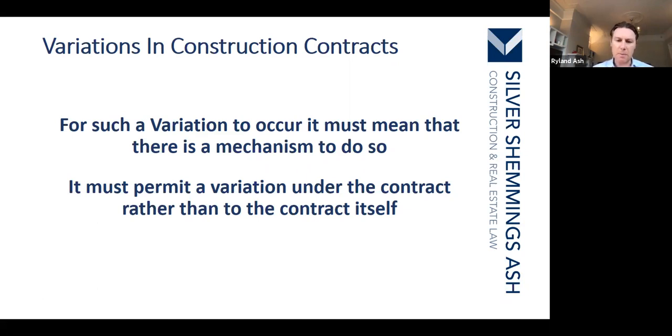And in the same way, if you think about it, if a contract has a provision that says how variations will be valued, then I'm afraid that would stand as well, notwithstanding the fact the parties may have sought to agree otherwise. So one has to be careful particularly when there are verbal agreements to change or perhaps to value or agree a valuation. Often you'll have QS to QS meeting up on the other side of the table, making agreements in relation to values. They may not have an effect if your contract has provisions that prevent it. So I thought that was worth mentioning.